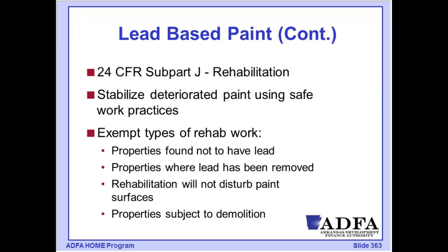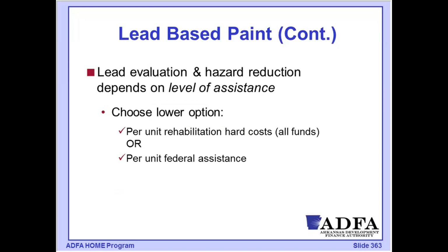In some cases, we might be doing a very limited rehabilitation that might not disturb any paint surfaces, and so we might be exempt from that. Also, if we're doing demolition and then we're going to replace that unit, or we're simply clearing a building as part of maybe a new construction rental property, or we're clearing an outbuilding on residential property, demolition itself is not subject to the lead paint requirements.